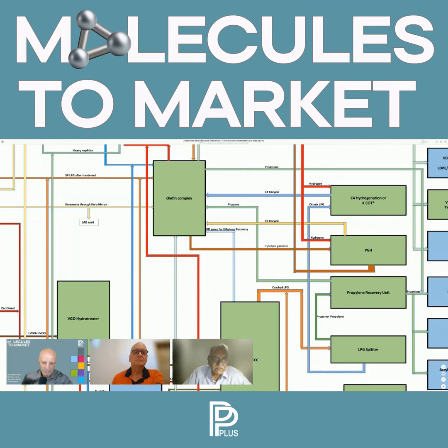So obviously, once a configuration is done, one or more than one, when we are doing option studies, we have to do a broad material balance. We have to come to the equipment capacities, unit capacities. And from there, we have a mechanism for working an order of magnitude estimate. And on that estimate, we can do a financial analysis using software to compare the two options, and then perhaps select one of the two based on the considered opinion of the house that, okay, this is what we can possibly go ahead with.